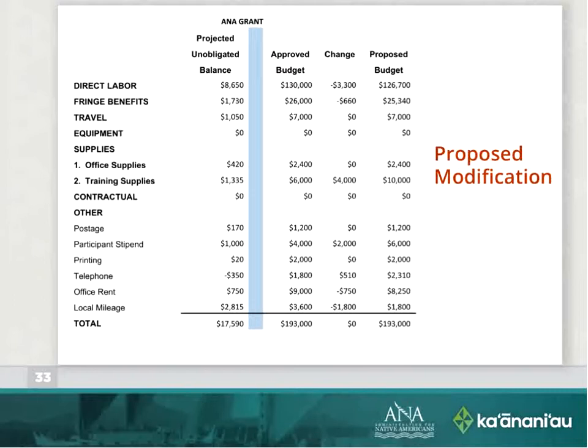Do I have any costs in here that would require that I get prior approval based on the cost principles? Well, if I'm a college or I'm a tribe, I look good there. However, if I'm a nonprofit, any movement of participant support costs requires a prior approval. So in that case, I am going to have to go to my program specialist and to my grant specialist about this. All right, and then follow that process. With A&As, there's a very specific process to follow for a budget modification. But that's where knowing the rules is so critical.